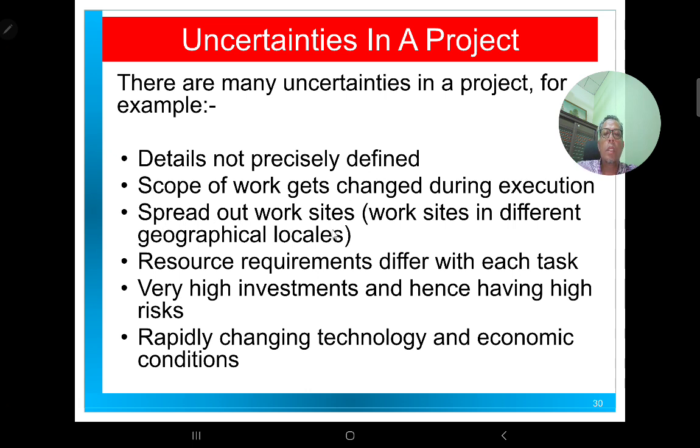Spread out work sites: that means if you are working on an infrastructure project, a number of people are involved in working at different sites in different geographical localities. So they need to travel, and you need time to get them there. These are uncertainties which will affect the time, the end of the project implementation.